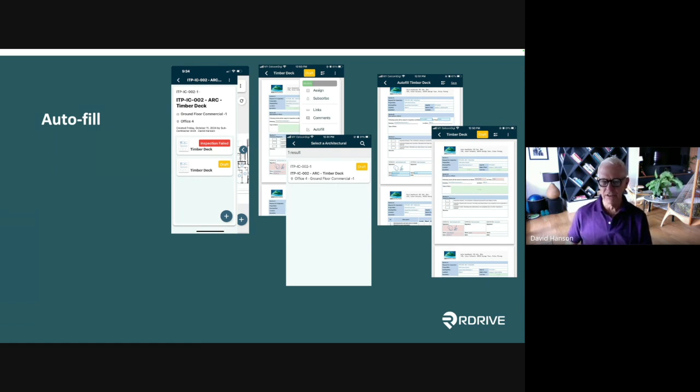And then the person doing the checklist can say, okay, let's say, for example, there's 12 checklist items that were needing to be filled out, and one of them got failed. The client developer or the main contractor, whoever is the next one in the process, can likewise use autofill from the failed inspection, and then just unclick the failure and click pass, and then change the workflow. So the whole idea here with autofill is it just saves a lot of time in filling out repetitive fields.